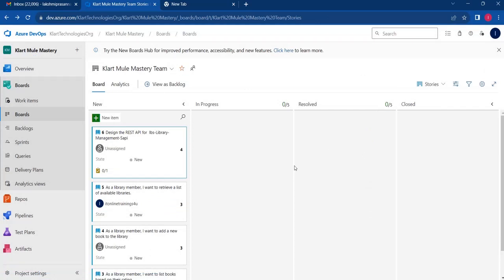The thing which we are going to do is in our daily scrum call. Daily there will be a scrum call, a 15 minutes status call. Stand-up call, status call, scrum call, all are the same. So every day as a developer, we will have a scrum call to update the status: what work you are going to do, what task you are doing, like that.